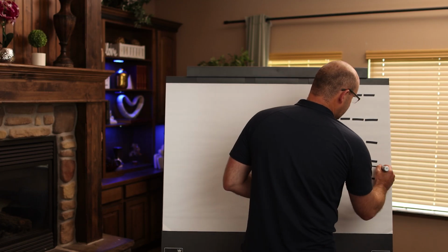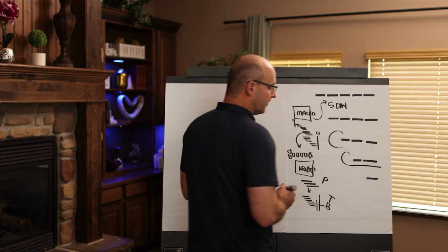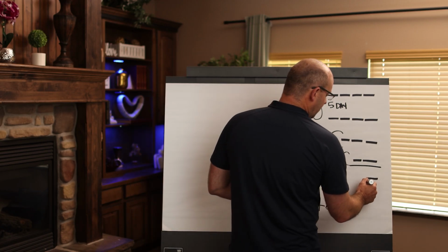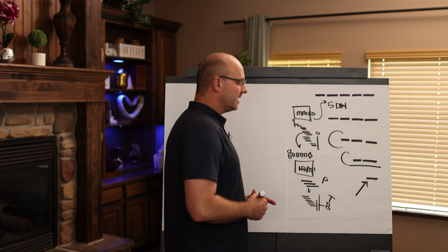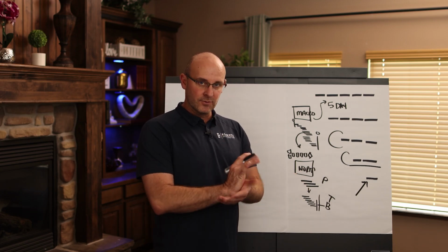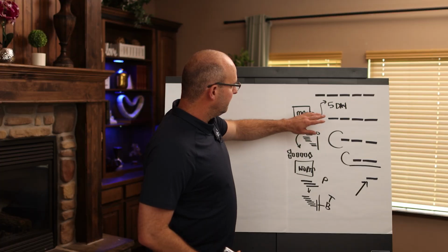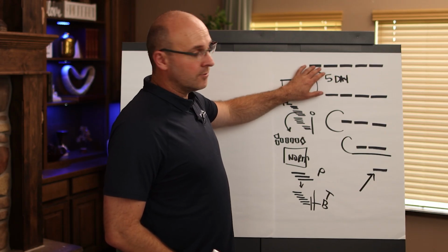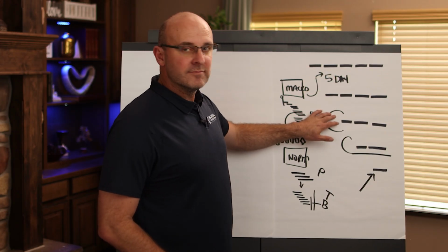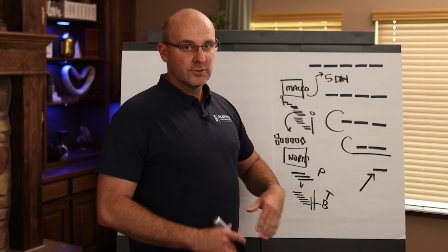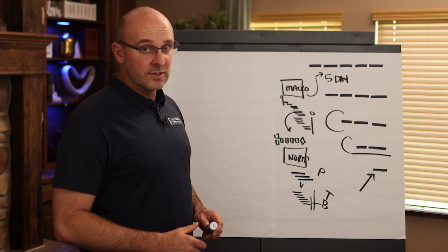This is when your trades are used to it and they're proficient, right? There will be a day, and for our construction company as well, where we want to get down to a 1-day takt time and really be jamming through that work at a really, really nice pace. So you're not going to stick with 5, because that's just going to waste a bunch of time. 4, 3, I understand that you're there. I want to encourage people to go more towards the smaller takt times because it really does a lot for you.